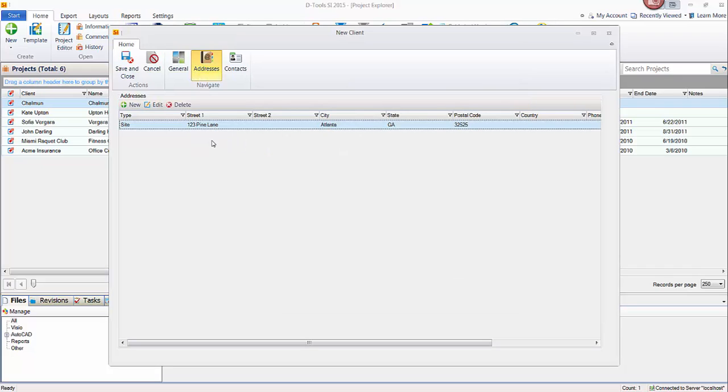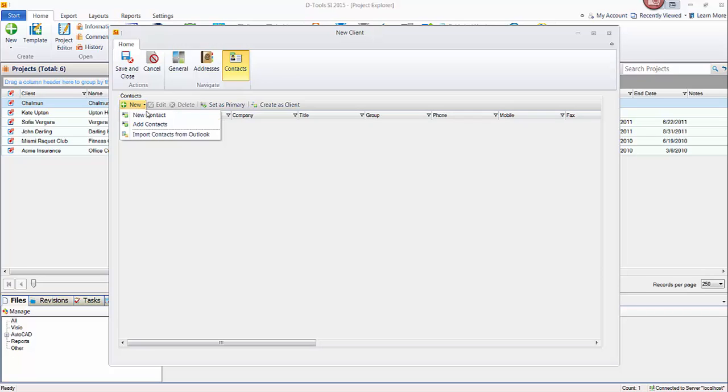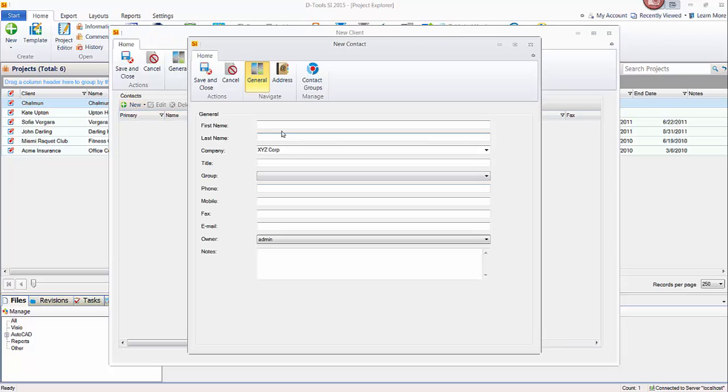So again, if you want to add multiple addresses, feel free. And you're going to want to add at least one contact here. The contact field in the project is what actually prints on the proposal and reports that require signatures, not the client name, the contact name. So definitely add at least one contact out here.